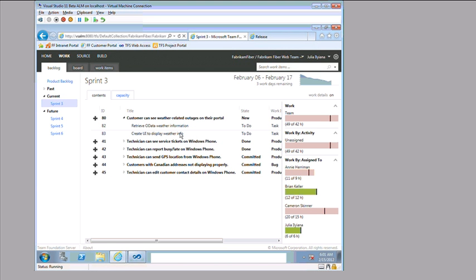This is where we get the idea in Scrum, and some of you may have had your antenna go up when I said this. There's an idea in Scrum specifically that you never change the sprint once it's been started. That is not strictly true. That's not strictly what the Scrum rule is. The rule is that you can't force the development team to change the sprint without their consent. And by consent, I don't mean that you extorted it out of them out of fear of their jobs. What I mean is, if a change needs to be made to a sprint while it is in progress, the product owner and the development team have to sit down and negotiate whether that work can be accommodated in the sprint.